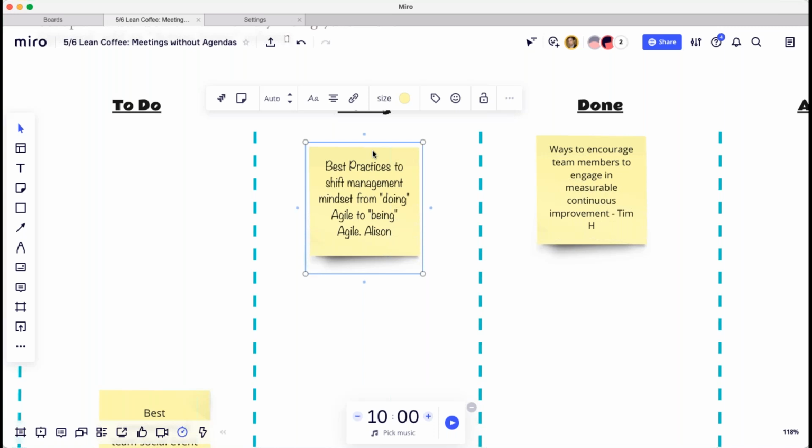They just normalized it, and we'd gone so far down this path of story pointing and relative sizing, and everything was awesome. But there was some executive who didn't like that because they didn't have that handle to control and understand the way they wanted to do it. So they standardized story points, and 1 point is 6 hours of work. And it came up in my community the other day, and it was almost like a revolt, right?